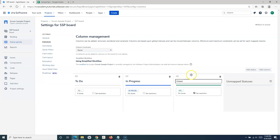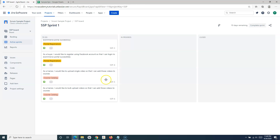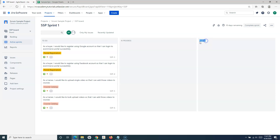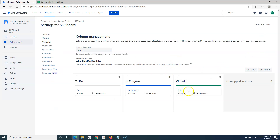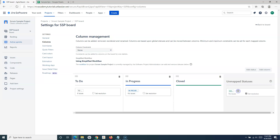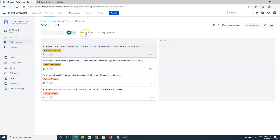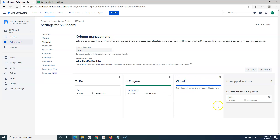You can change the name of a column — for example, rename 'Done' to 'Closed'. Going back to the board, you'll see the column has been renamed. Also, if you unmap a status from a column, that column will be hidden on the board. There must always be at least one workflow status mapped to a column for it to appear.